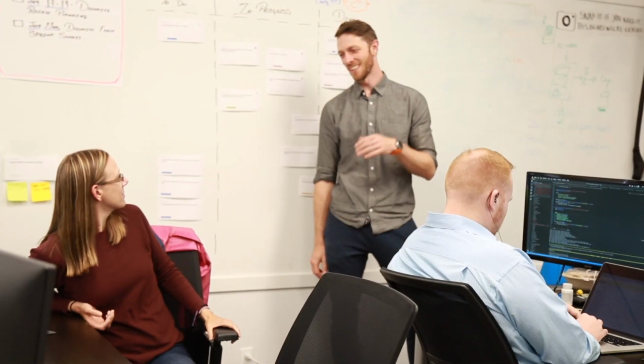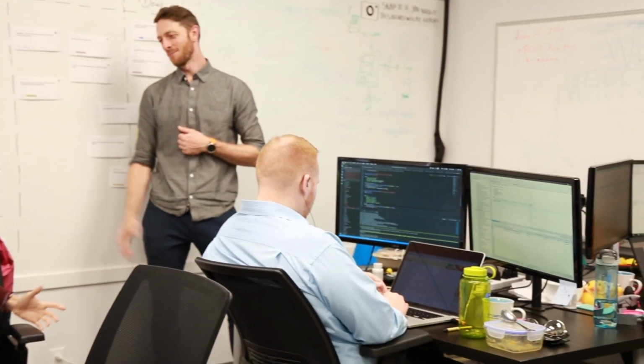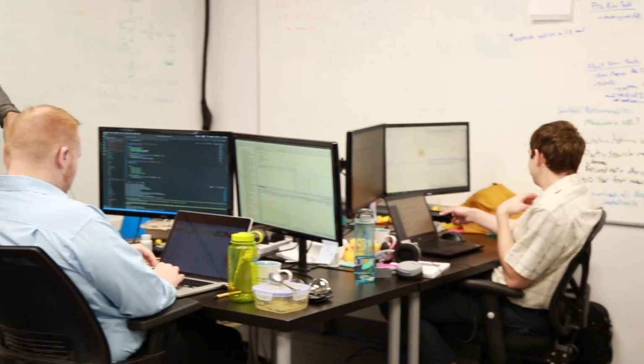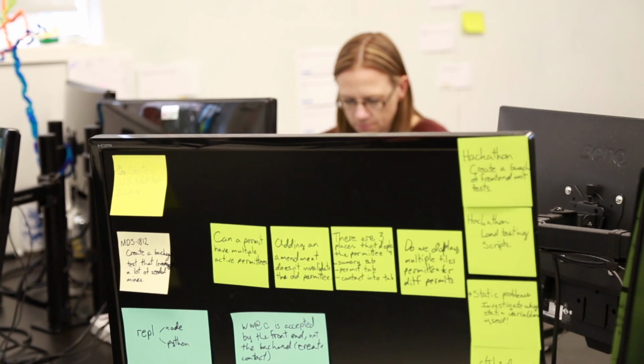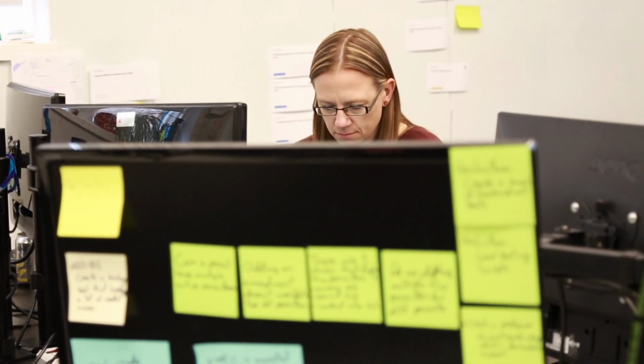So now we're able to add seats, add doors, and we eventually realized that instead of needing a vehicle to get from point A to point B like a Jeep, they needed a bus to get from A to B. In traditional development, we would have built a Jeep and handed it to them and realized that that Jeep was not sufficient to meet their needs. So what we've been able to do in this instance is save money, save time, and ultimately solve the real problem that the users had that they may not have even known they had until they saw something in front of them and were able to identify their own problem.